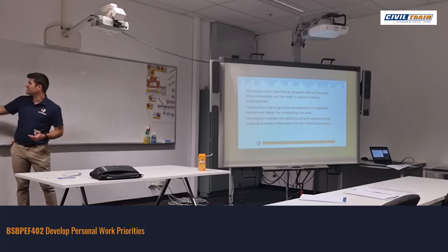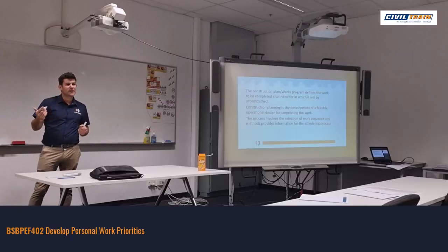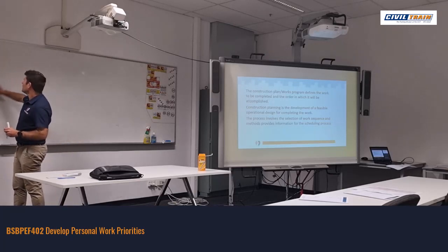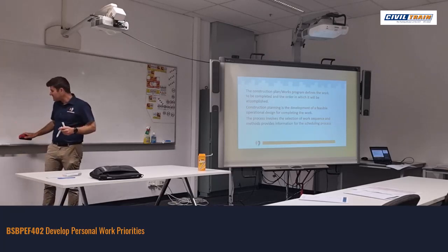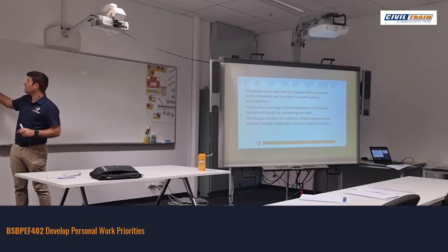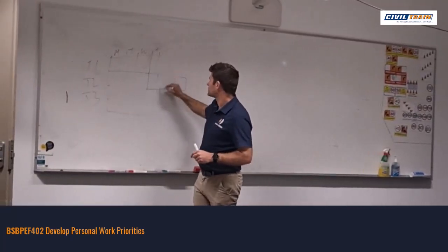So what we're saying is, if I did Monday, Tuesday, Wednesday, Thursday, it's sort of showing that everything's starting. We've got 3 activities starting on Monday. But often what you'll find is what I'd call a cascading bar chart, where the cascading bar chart comes into play is when task 2 is dependent on task 1 being completed, that's when we would start task 2.